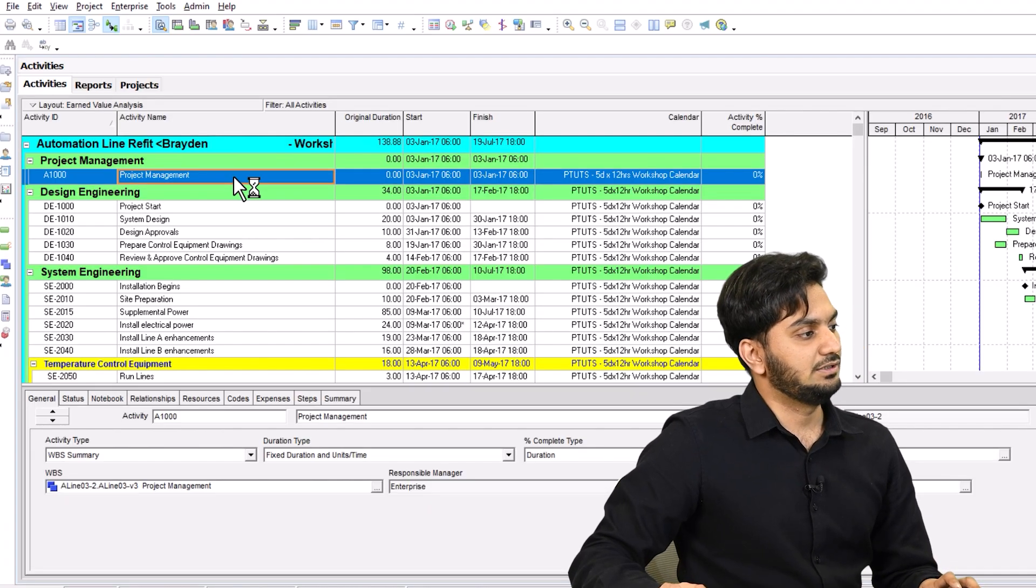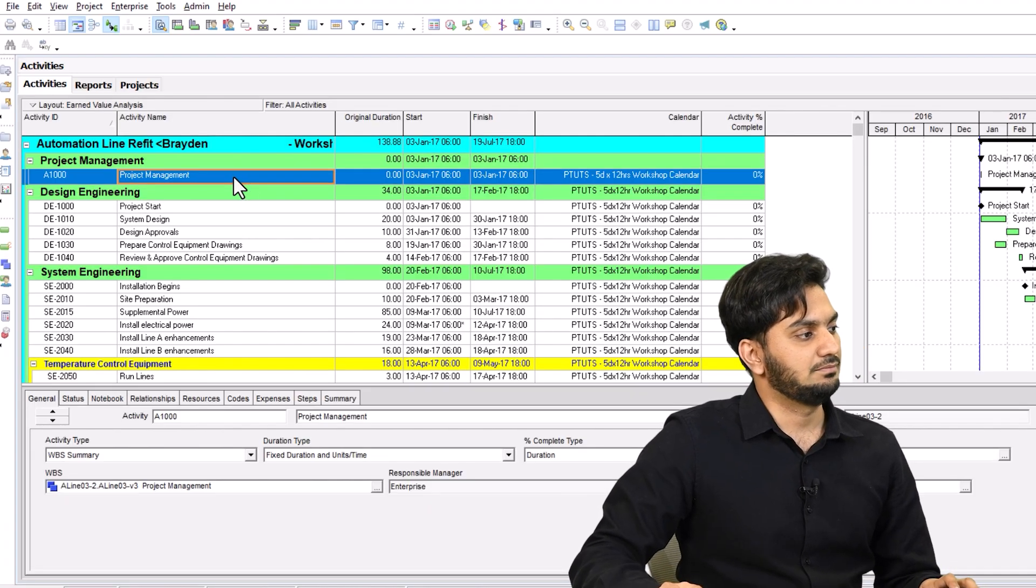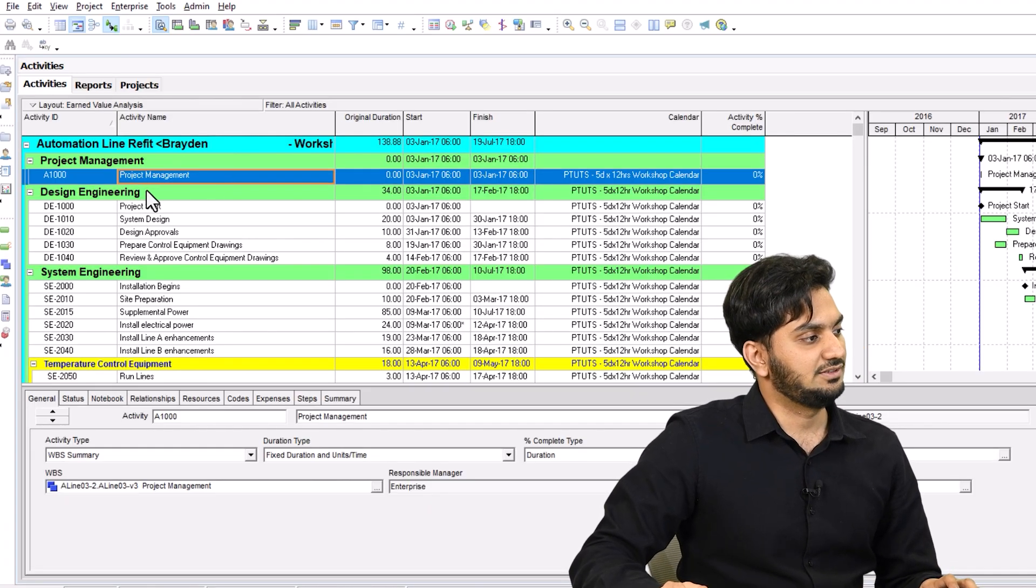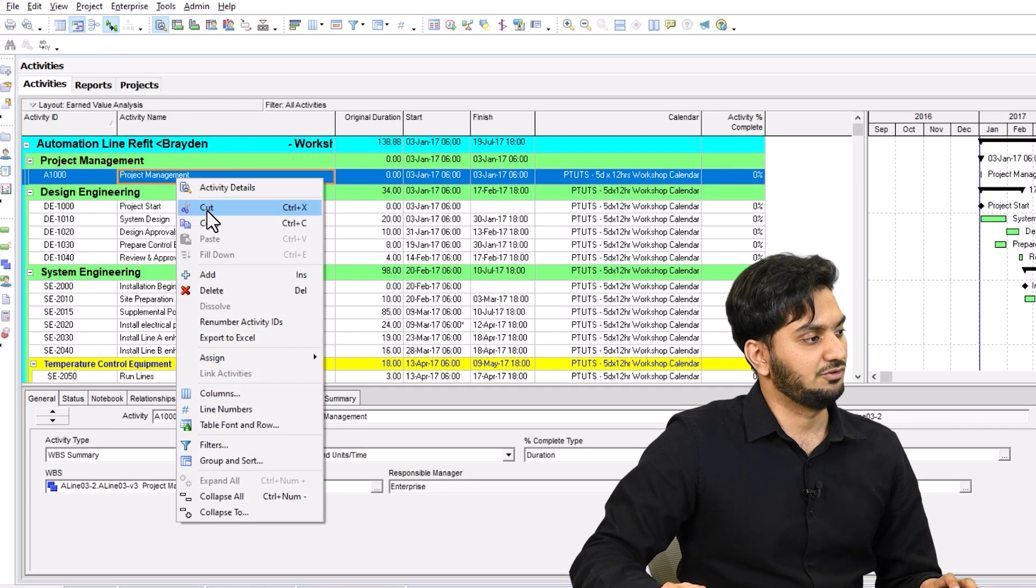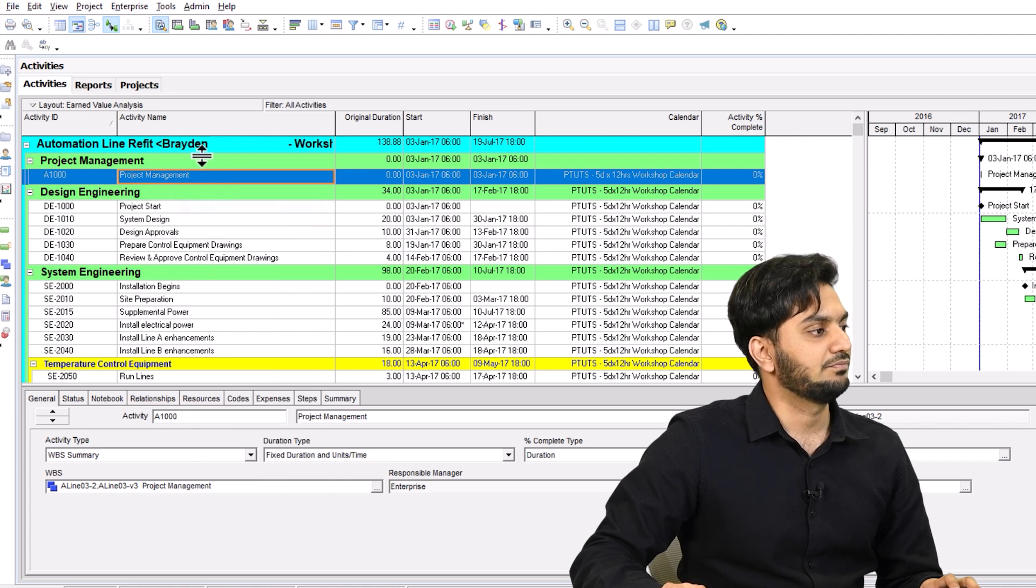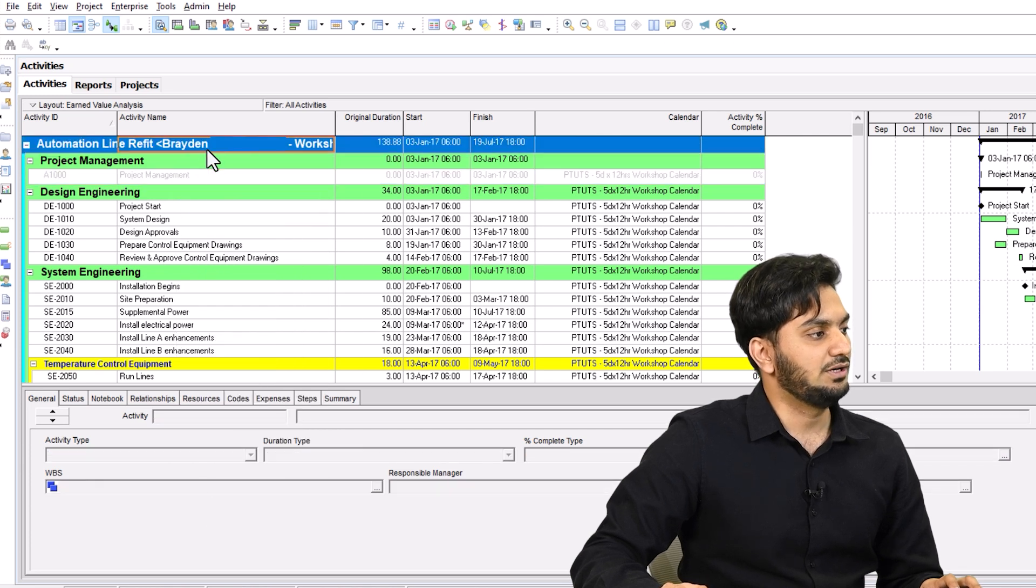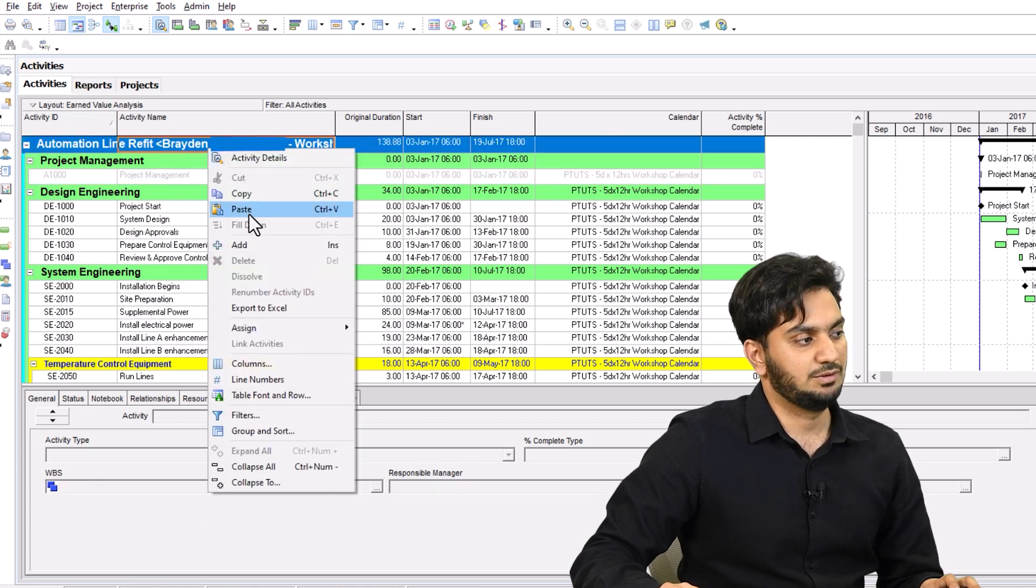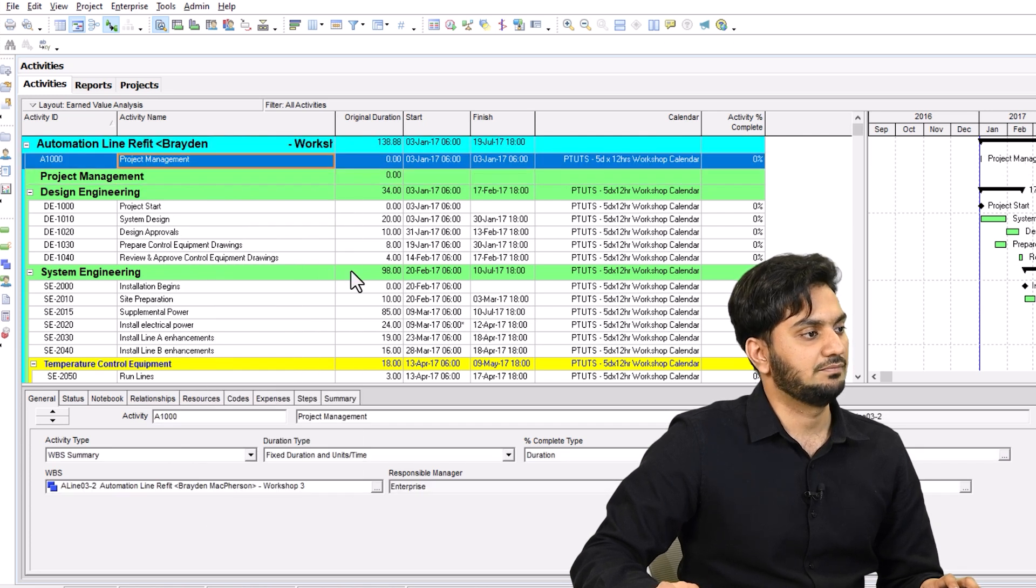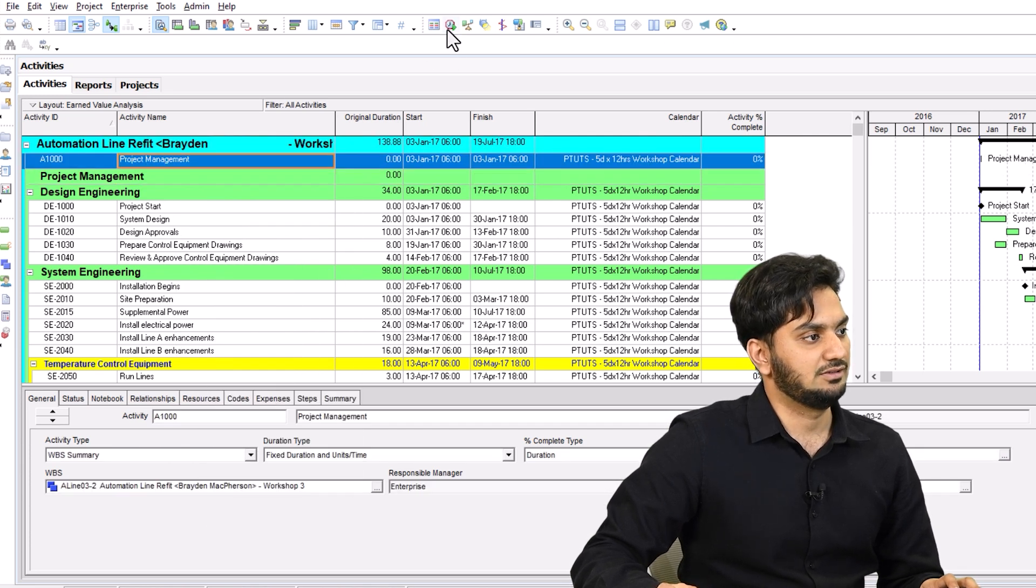Here you are, under the project management, this is the project management activity. Once you cut it, put it out to the project level, and then schedule it.